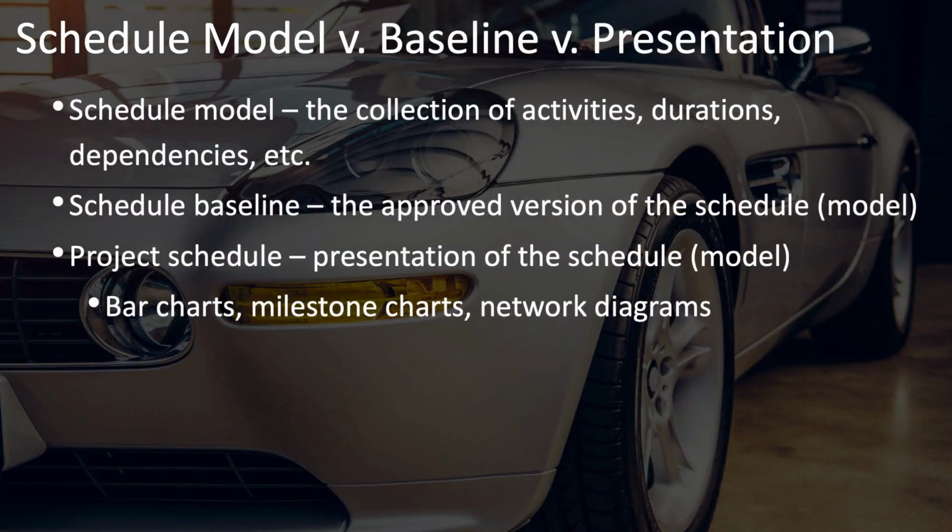Remember to keep in mind the difference between these three key schedule artifacts: the schedule model, the schedule baseline, and schedule presentations. The schedule model is that collection of all of the activities, durations, dependencies, and everything about the schedule, all as one abstract collection of information about the schedule.